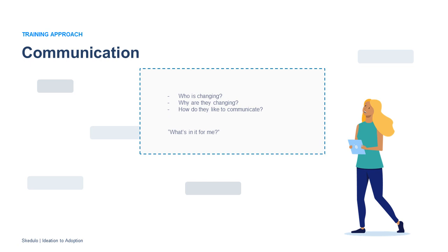Finally, work with team leaders to identify individuals who may have a more difficult time than others adjusting to the new process, such as those with weaker technical skills. If you're conducting group training, consider pairing those people with more highly skilled peers, or have them trade one-on-one so that they can move at a more appropriate pace. Change can bring out people's insecurities, and a surefire way to set back your transition is to make people uncomfortable or embarrassed with using your new system.